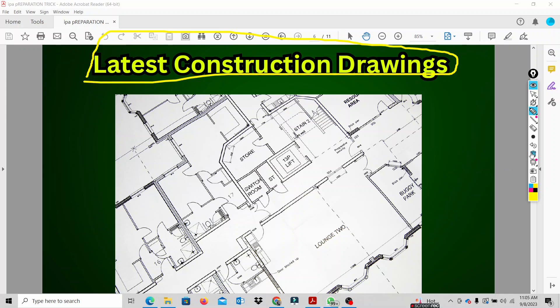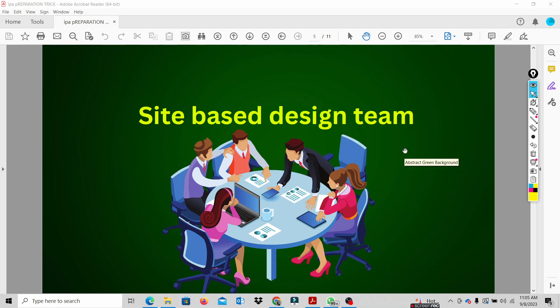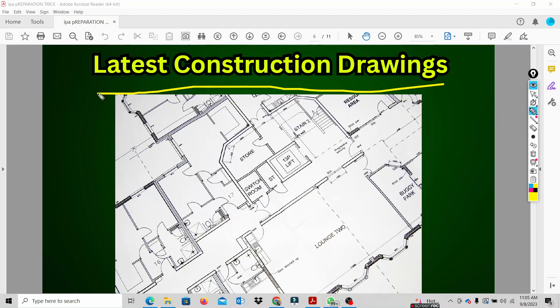We will reach the design team for the first time. We will meet the head of the design team and get the latest construction drawings from them.